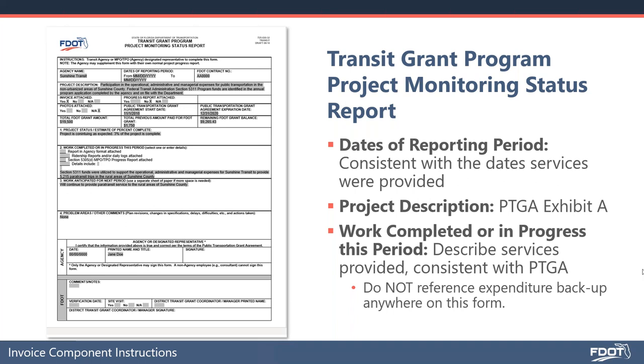And when you submit your backup documentation, you would include all of the expenses you're requesting. It's on a cost reimbursement basis anyway. So when did you pay the bill? If you paid the bill in May, then that's when you would include it in the May invoice, even if you purchased it in April but paid the bill in May. Correct.